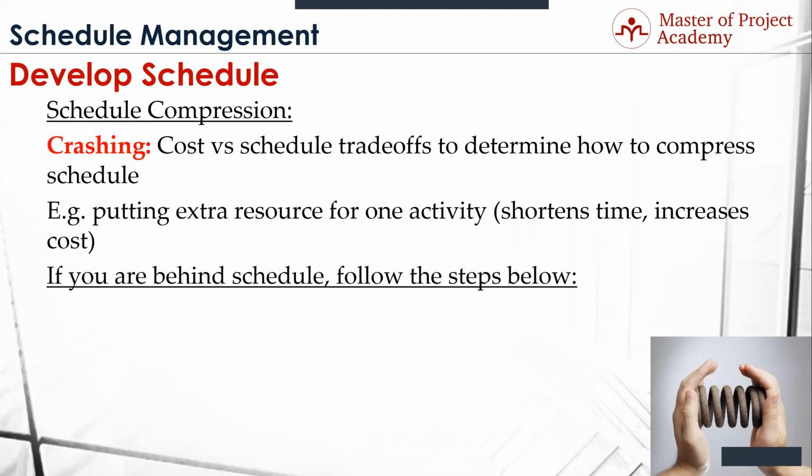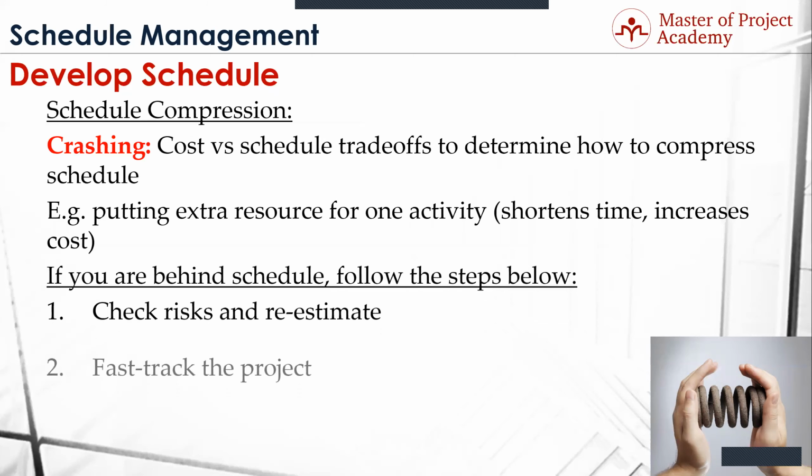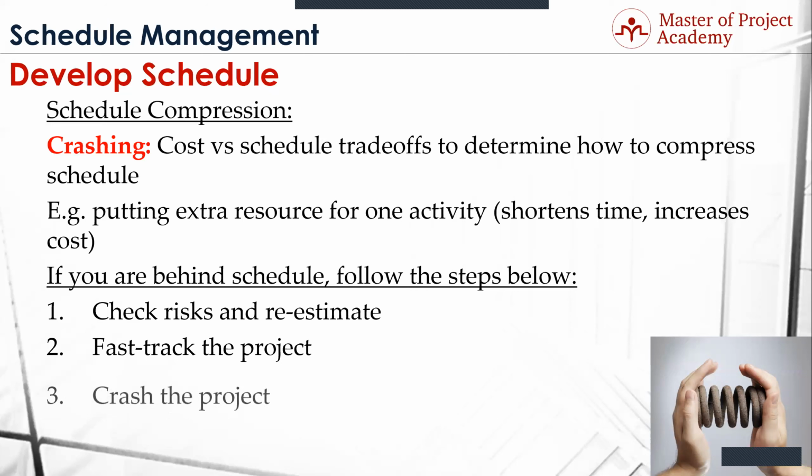So if you're behind schedule, you can follow these steps to do crash. You want to check your risk and re-estimate. And then you can either fast track the project or crash the project. Now, I don't think there's an example of crashing in here, but on the exam and in my document that I sent you